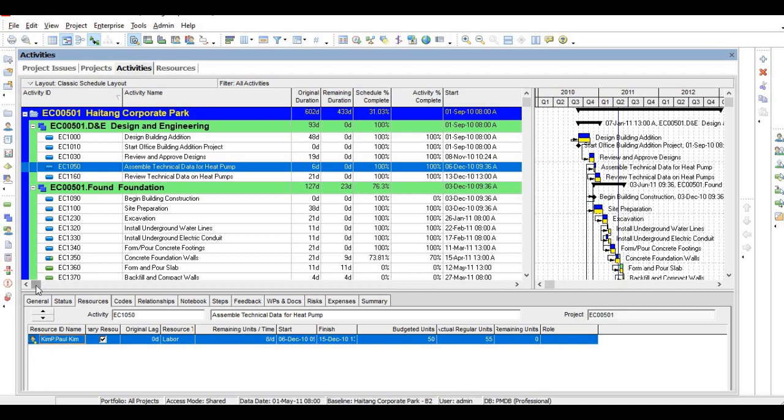So this is the first stage. There are two stages in the project. Planning, scheduling, and budgeting happen before starting the project. After starting the project, they will ask for project progress. Project progress is nothing but comparing your approved schedule with the actual progress. For that we use a concept called tracking progress. For tracking progress, you have to set a baseline.